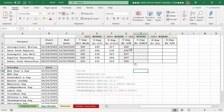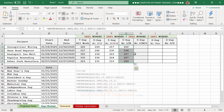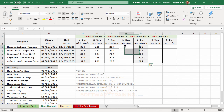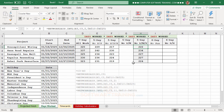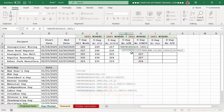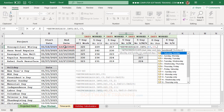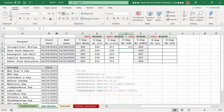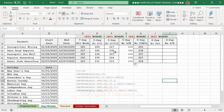There was a mix-up placing formulas in the wrong columns, so we move the cell and redo the version without holidays. The formula is: equal, NETWORKDAYS.INTL, start date, comma, end date, comma, number 2 for Sunday-Monday, then Enter. We copy it down and use the Format Painter to restore the formatting.